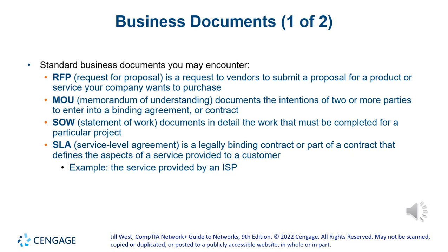I said, hey, I want to replace the wireless at Miami-Dade, and I have, I don't know, 20 buildings, and each building has 4 floors, and I want to connect Wi-Fi everywhere. So can you give me a proposal? How much will it cost me to do that? So the companies will have to reply to this RFP with the quote and their designs and things like that. Then you can also have the MOU, the Memorandum of Understanding, right?